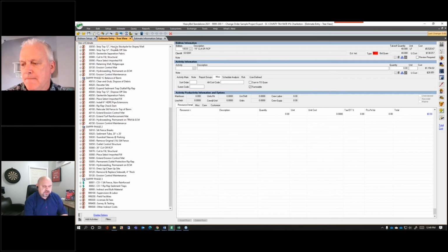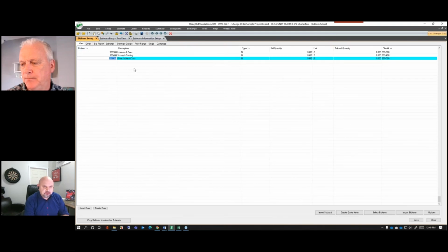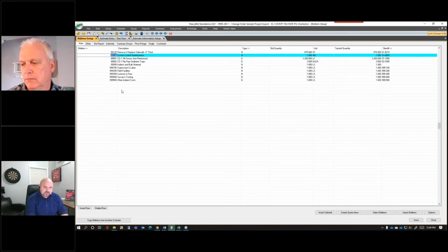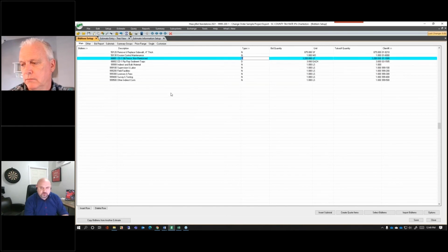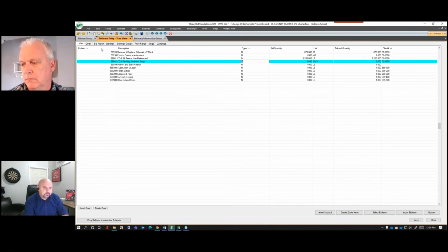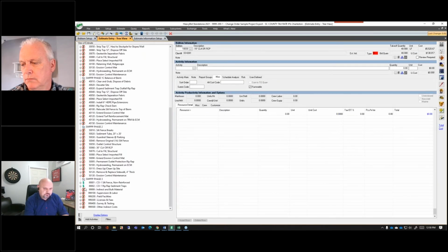As I scroll down, I've said, okay, I have a new one, and I start all my change orders on this project with a bid item code of 888. This is my first change order, and there are 2 bid items to this change order for CO1. I added them, and they are the only items that are a direct add, so that's a D instead of an N. I came over here to my estimate tree view, and we can see those items.